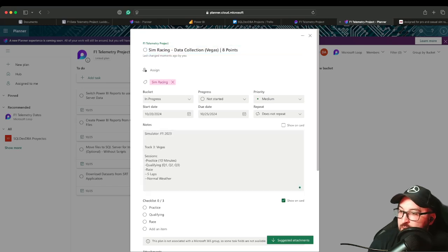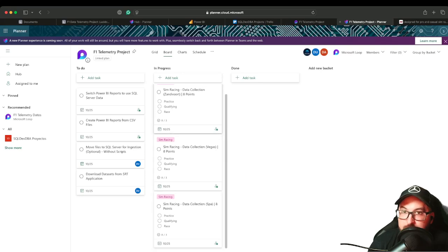And now what we have are 3 different tasks that Morse can manage separately. And what does this mean? This means that we're going to be able to show completion of items throughout the week instead of just one at the end of the week. This means that whoever's responsible for the BI report is going to be able to see that those tasks are getting done and start asking for the data. They know they're starting to need to get ready for that data.